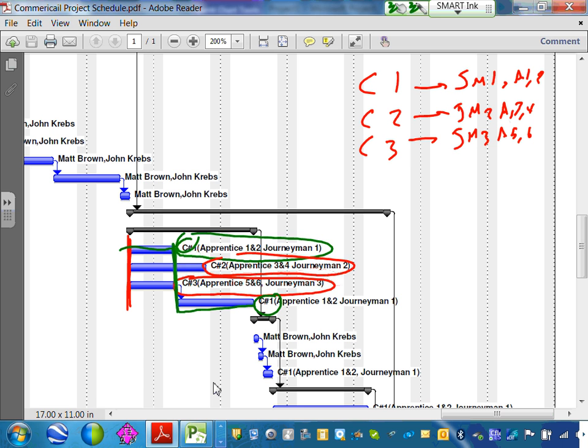Okay. So please pay a lot of attention to the construction when it comes to linking that, and I can help you link it this way, guys. So for example, crew 1, crew 2, and crew 3, these 3 tasks, they don't need to be linked with each other. They have to be linked with everything above them. They have to, but not with each other. When you reach that one, if you made a mistake, we'll unlink it and relink it again.